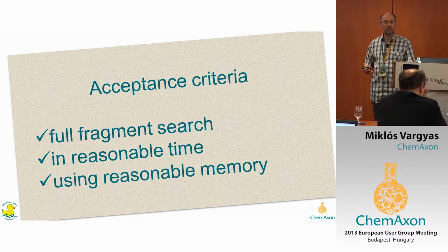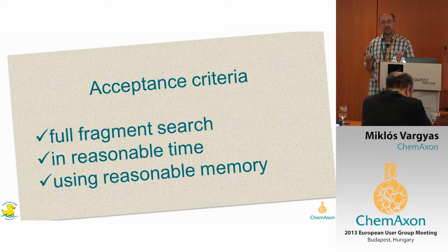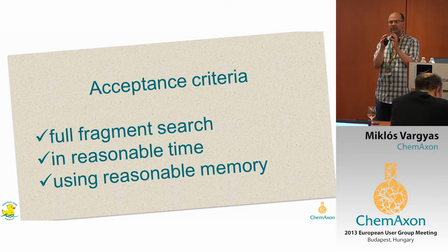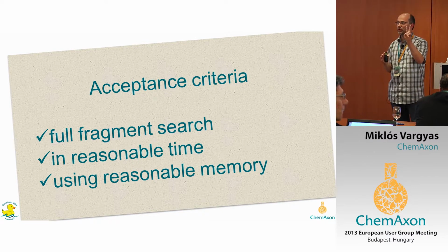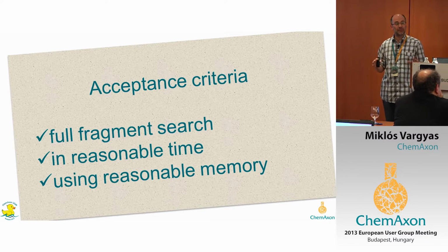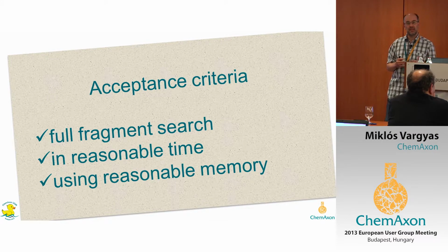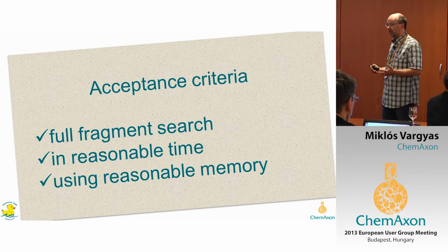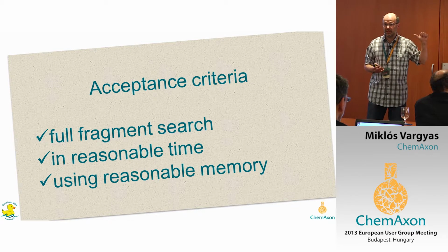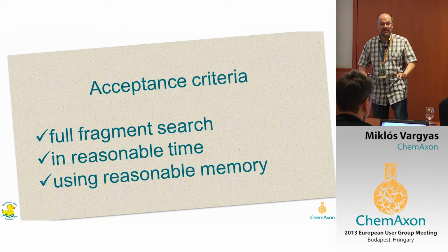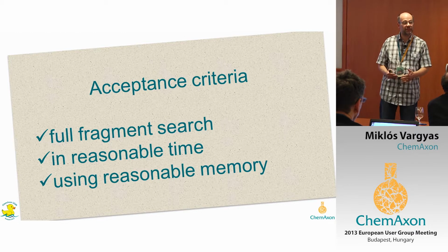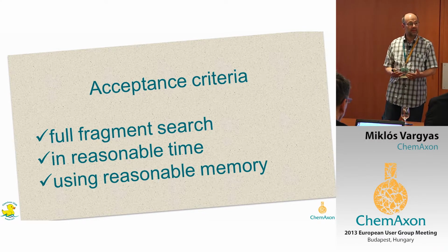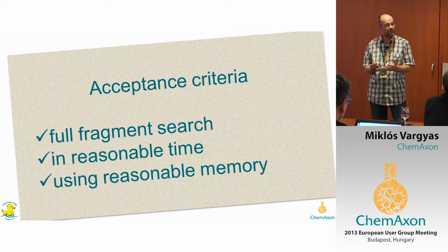But instead of discussing more and spending more time on guessing what to do, the team chops off a little bit of the story, something that they think or rather feel can be done in 2 weeks. Yes, just 2 weeks. And they start work on this new feature or the story immediately. They do everything that in traditional software development has to be done, right? They do requirements analysis, they do high-level design, low-level design on, I don't know, the level of classes, for instance. They do the implementation, so they code. They write tests, lots of tests. They even write the documentation, all in one.